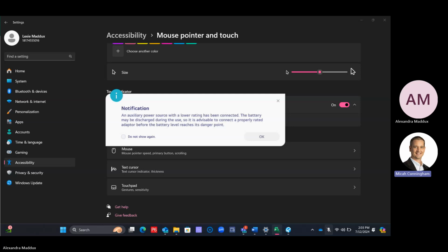So if the form slab for some reason was taking 10 days instead of the 4, it's not going to actually push anything out. Do you see how this duration extended, but it didn't push anything? It wouldn't even push your substantial completion. It has the successor, but nothing with the finish pushing it out. But it would say that your overall project completion is later.